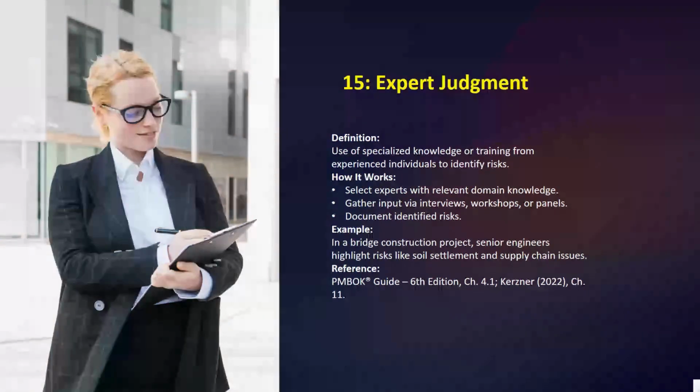Their insights can help you uncover risks that are not obvious to the rest of the team and provide valuable context based on their real-world experience. It is a very common technique which we use to identify risk for our projects. Here we have an example in a bridge construction project. Senior engineers highlight risks like soil settlement and supply chain issues.